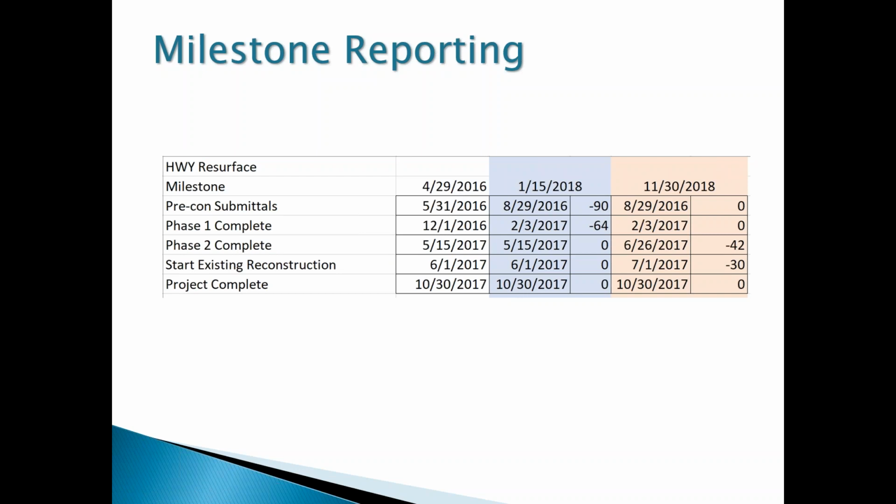If you're doing vertical construction, a good milestone to put on a spreadsheet like this may just be your foundation structure, obviously. Getting your building dried in. There are several different ones depending on the type of building or structure you have. But find those critical milestones that are important for hitting project completion, identify them, and then just put them on a spreadsheet. So in this case, here was the original schedule, and those were the dates that we put in.